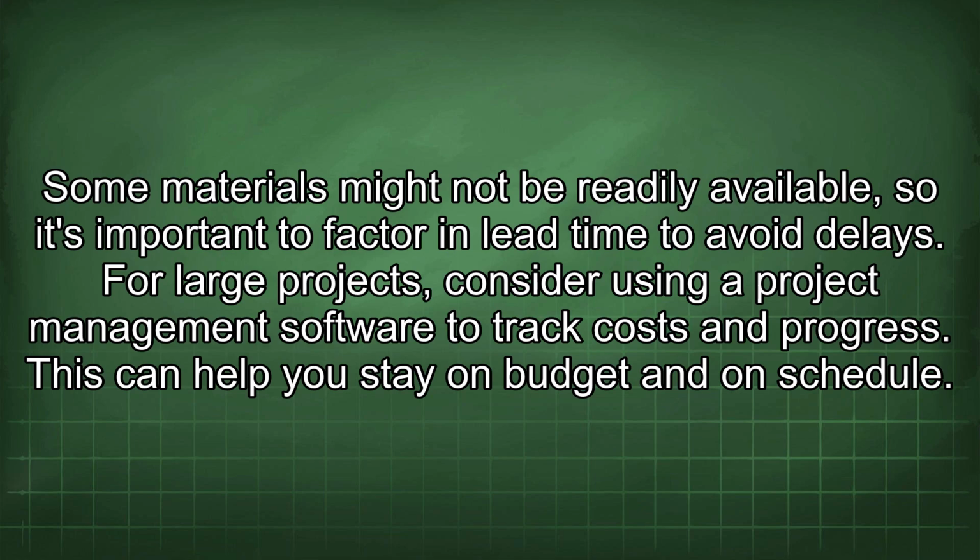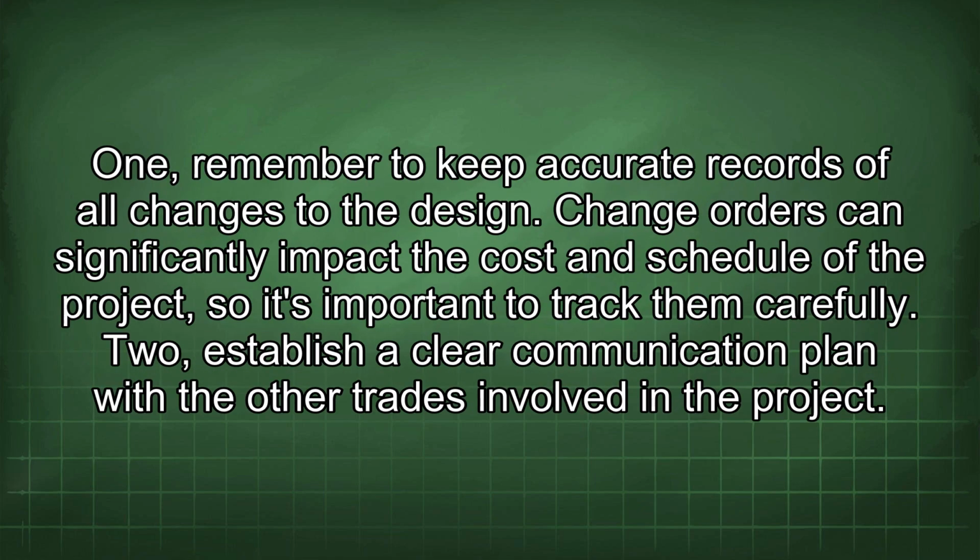For large projects, consider using project management software to track costs and progress. This can help you stay on budget and on schedule. 1. Remember to keep accurate records of all changes to the design. Change orders can significantly impact the cost and schedule of the project, so it's important to track them carefully.